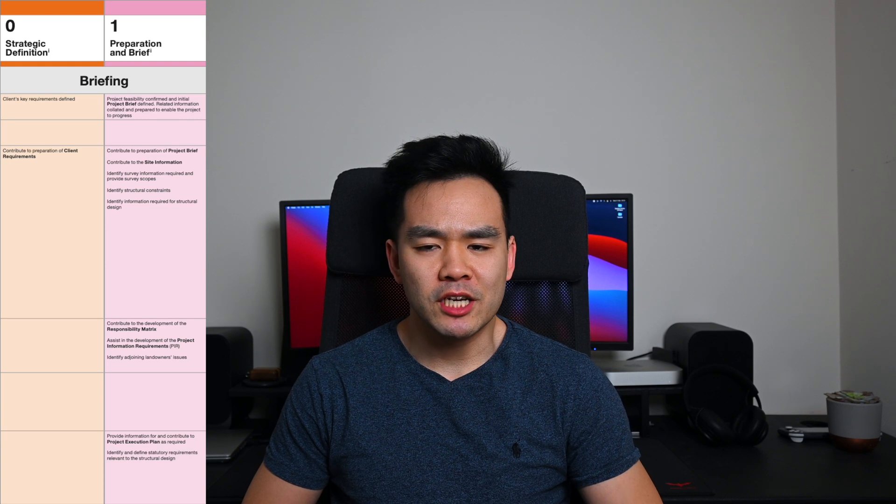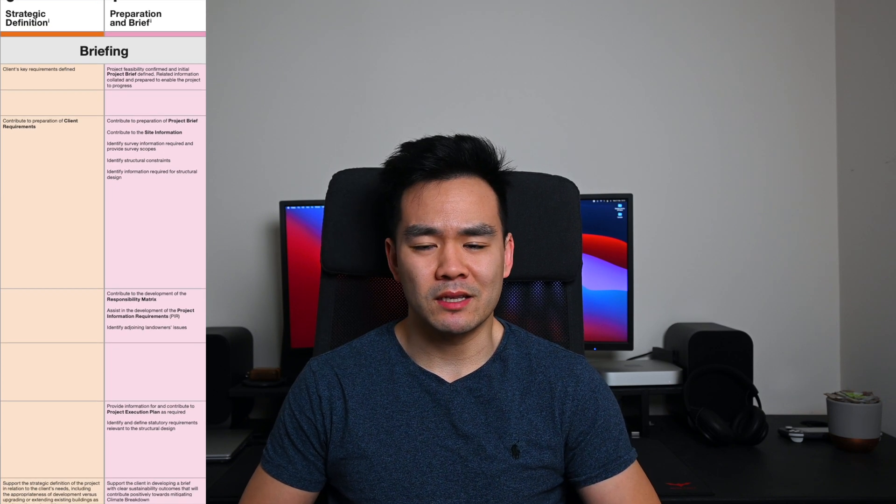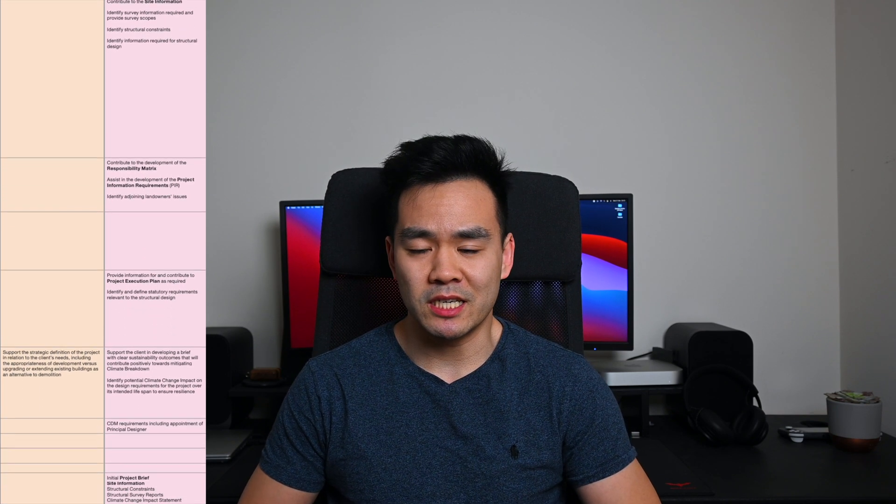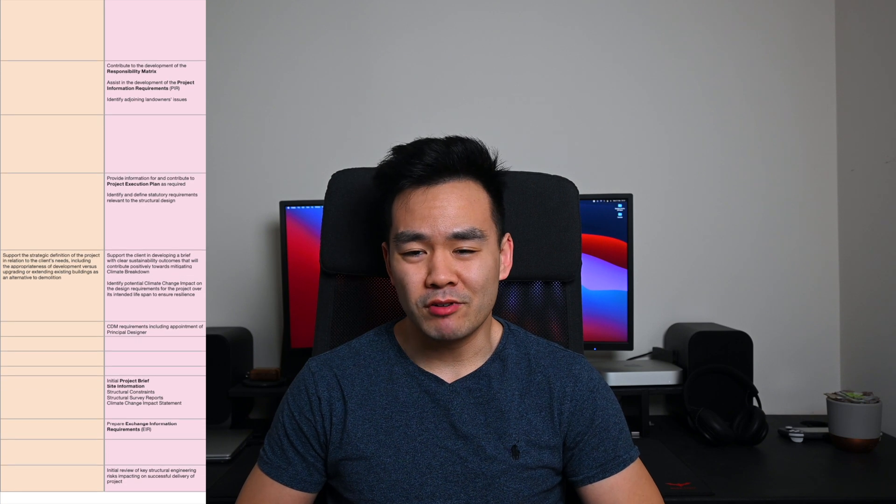At stages 0 and 1, I don't think a structural engineer really gets too involved. You might get a little bit involved in stage 1 when you're looking at site constraints and maybe preparing a small report for the client just to see what kind of surveys they need, but generally you probably won't be involved at all.